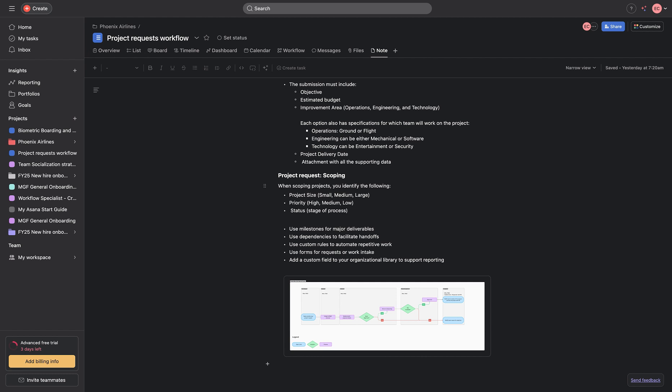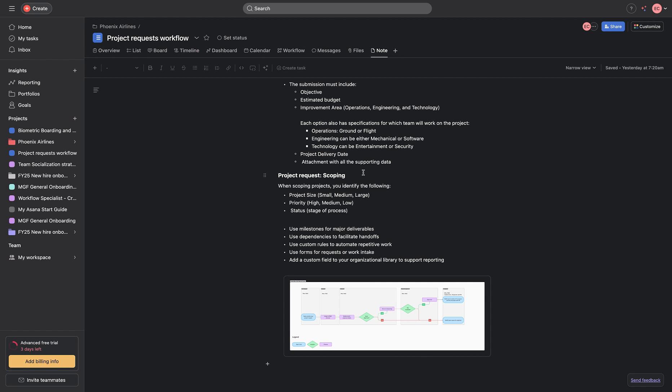And we've made that particular research and we've brought that different information. We need, number one, the objective of that particular project request. We need an estimated budget. We need to be able to see what area do we want to improve. And secondly, we need to look at what team should be working on this: operations, engineering or technology team. And then, we attach a document to support the data. And then, we go on to verify and approve that particular project or we reject it.